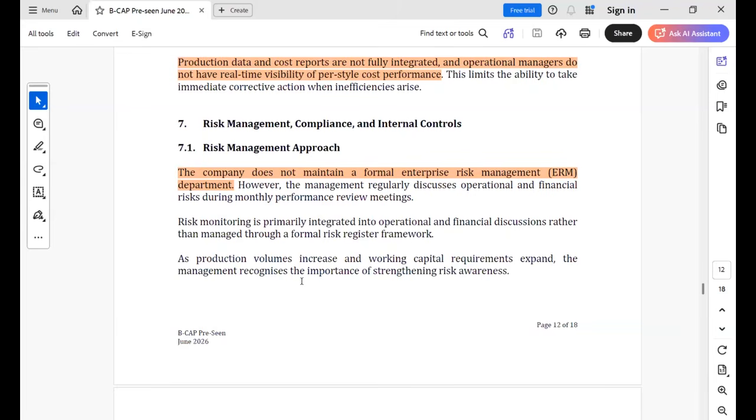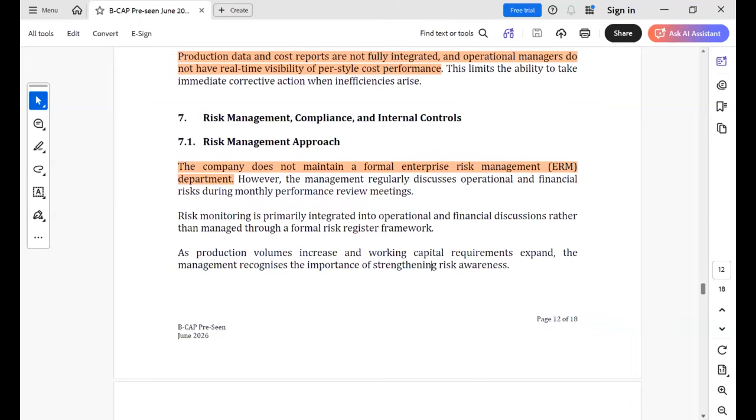because risks you have to categorize, no, controllable risks, uncontrollable risks. Controllable risks, right? You can eliminate. Uncontrollable risks you can minimize, right? For example, exchange rate fluctuation, right? When rupee is depreciating, it is a risk, but you can't control it. But you can minimize. How? If you purchase locally, you can minimize. Or, right? So likewise, you can take some actions.